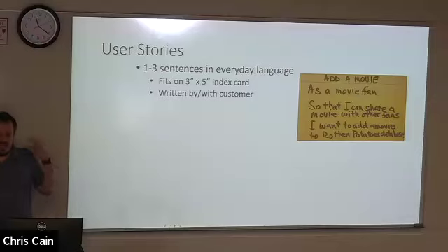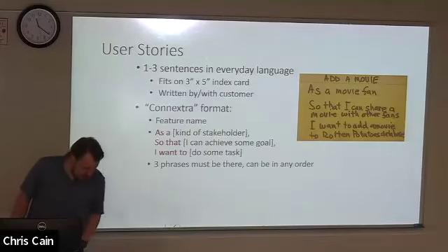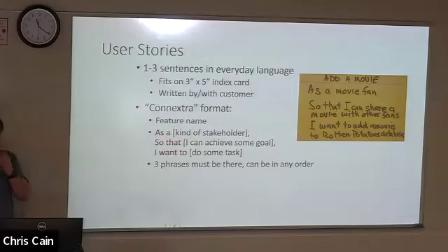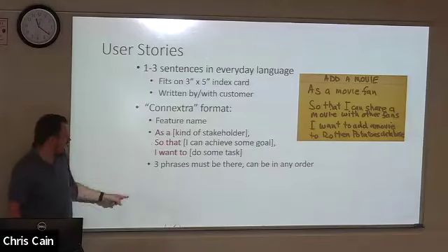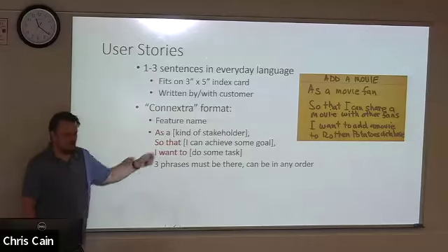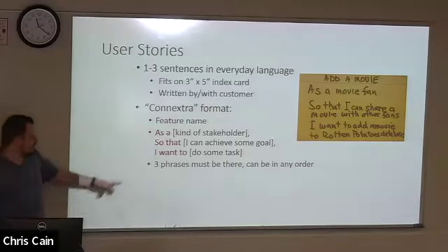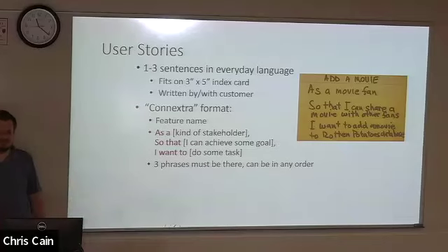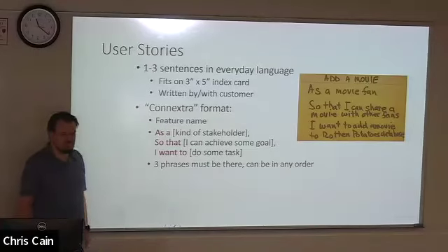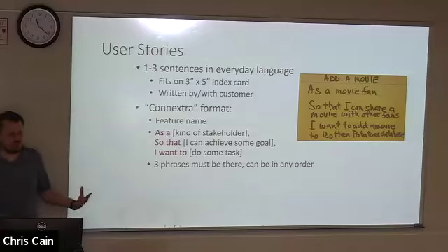So very short, everyday language. Usually it's either written by a customer or written with a customer right there with you. This is the format that you're going to submit your user stories in. It's called the Connextra format. And again, just flip the second and third one. As a stakeholder, I want to do some task so that some goal gets achieved. A goal from that stakeholder. I find that that has the most logical flow to it.